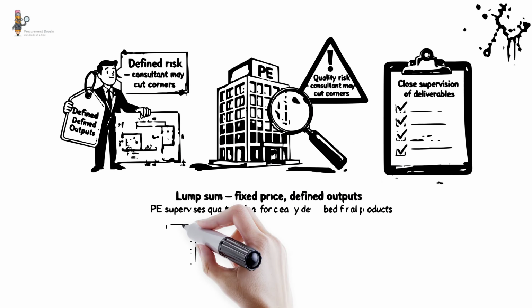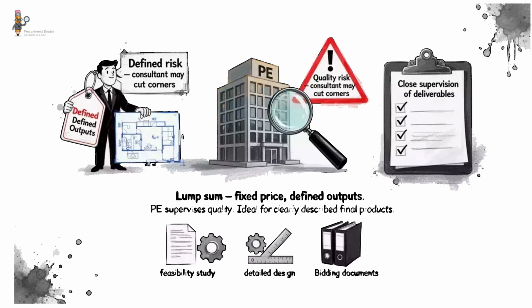The key risk is quality. The consultant may try to cut corners to save costs. Close supervision of deliverables is essential. A lump sum is ideal for feasibility studies, detailed designs, preparation of bidding documents, or any assignment where the final product can be clearly described at the outset.